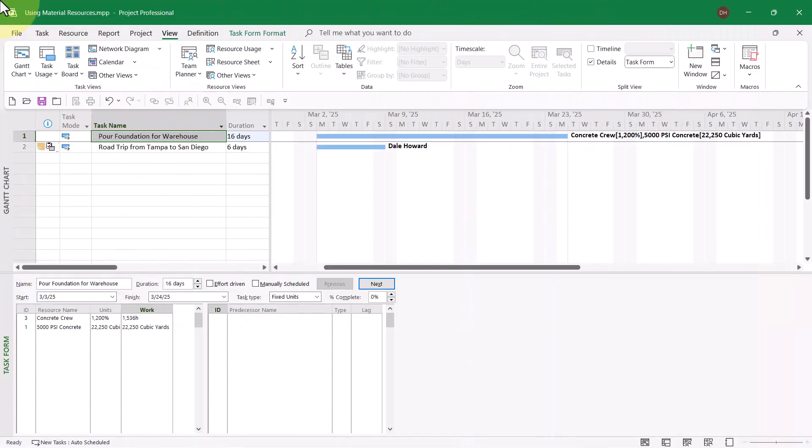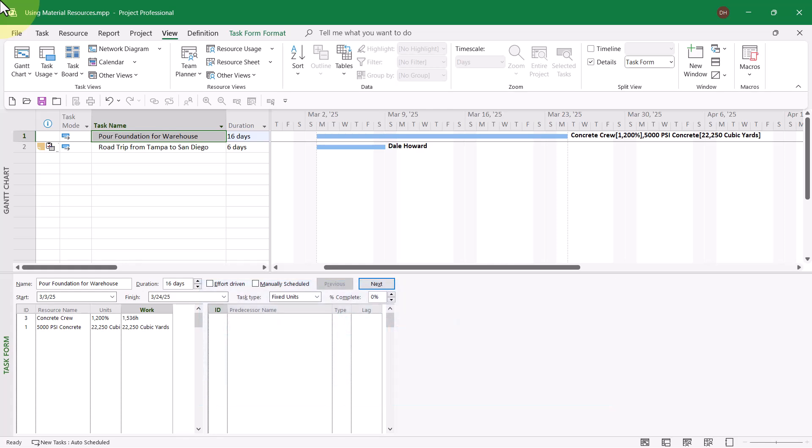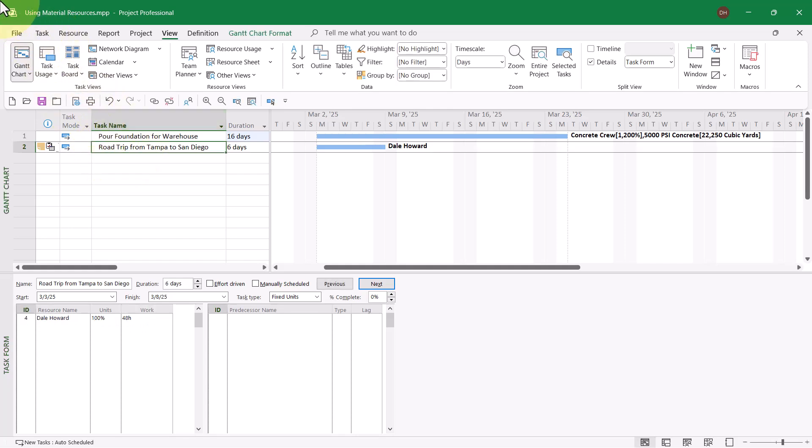The second method for assigning a material resource to a task is using the variable consumption rate method. You use this method when the amount of the material resource consumed depends directly on the duration of the task. That is certainly my situation with the second task in this project, road trip from Tampa to San Diego. I'm going to be driving from the Tampa Bay area of Florida to San Diego. I have an estimate of six days duration. I would like to track how much gasoline I consume on the trip. I need the variable consumption rate because the amount of gas I consume depends directly on the duration of the task.